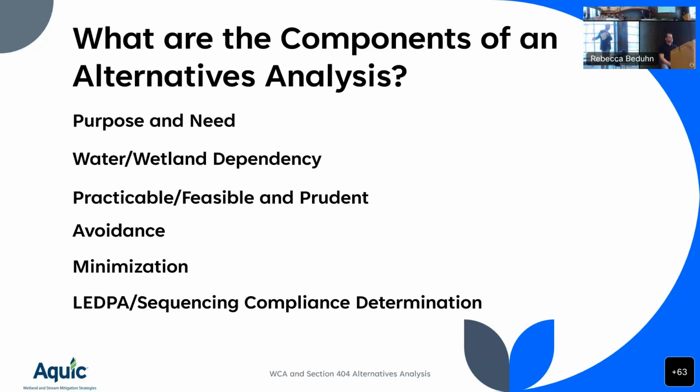Then we get into compensatory mitigation. Compensatory mitigation does not affect the LEDPA determination. That comes after. You can't say, well, it impacts more wetlands, but I'm going to buy mitigation, so it offsets it, so it really isn't impacting anything. There's a hard line. You have to come to the LEDPA conclusion before you get to mitigation. So anyway, I'll throw one thing in here and then I'll stop talking.